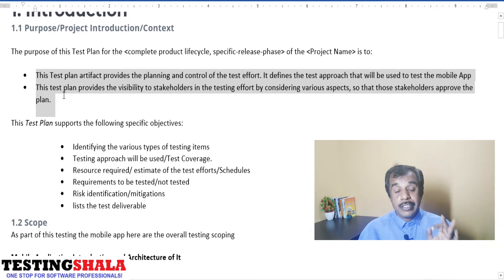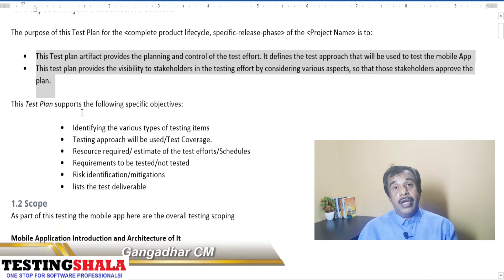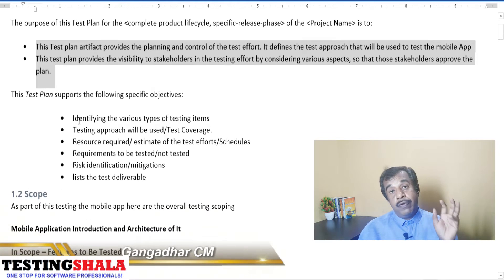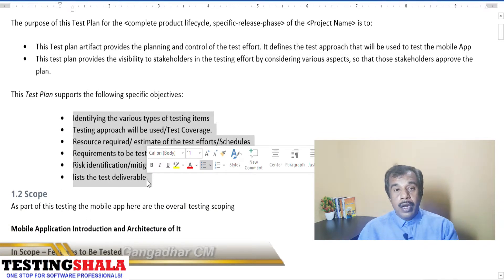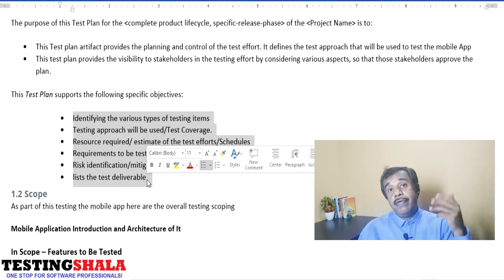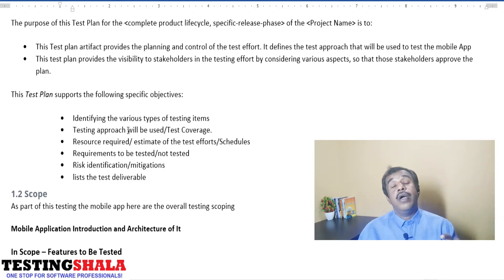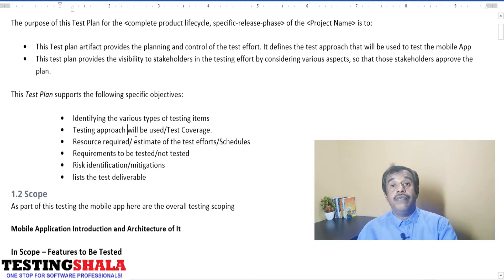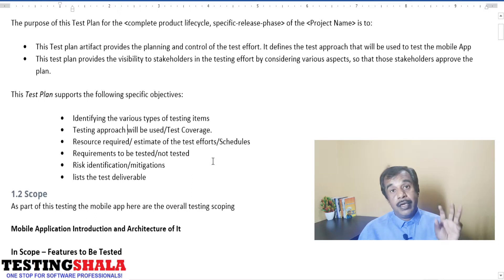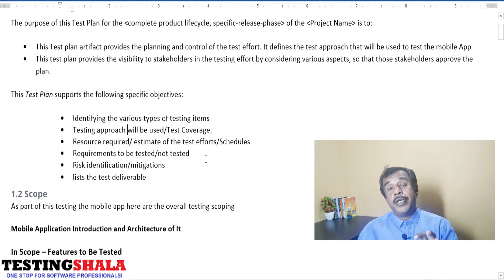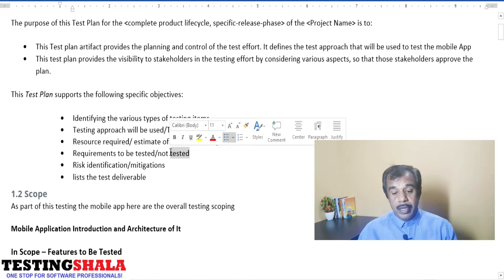The overall goal of the test plan is: first, identifying the various types of testing we will perform — from a strategy perspective. Second, identifying what resources are required once we know the different types of testing. After estimating test efforts, we can determine how many resources are needed and put together an overall test schedule. We also document what requirements are to be tested and what are not.